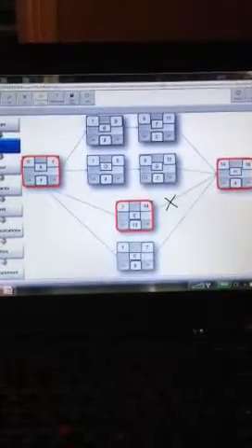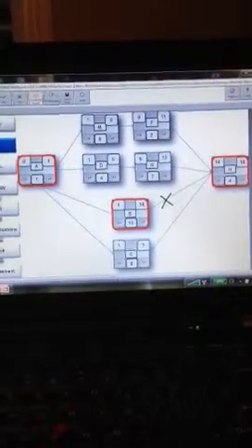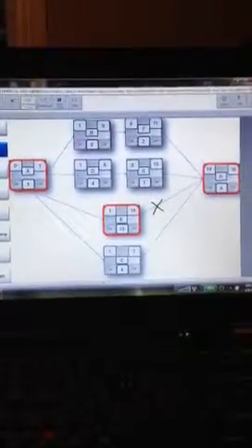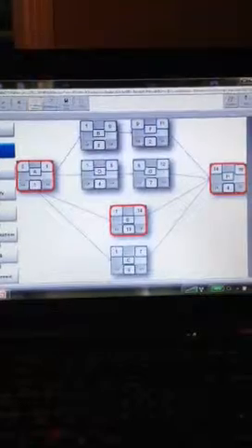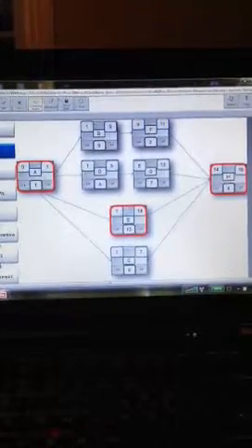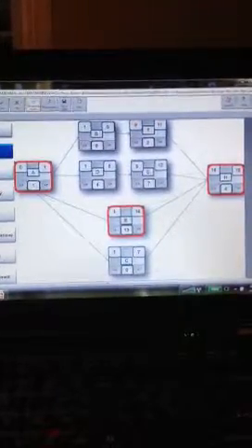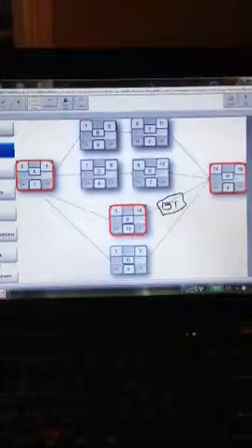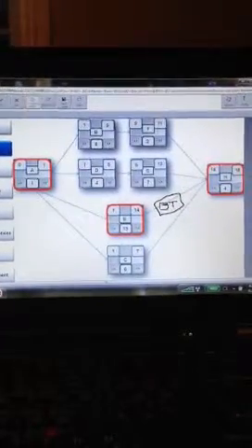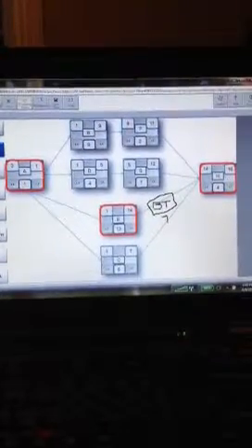So because Jim is now considered a limited resource, we basically have to add time to the critical path. We'll just call this buffer time, which sounds like way more fun than it actually is. Let's say Jim has 7 days for vacation. We've got to add buffer time.